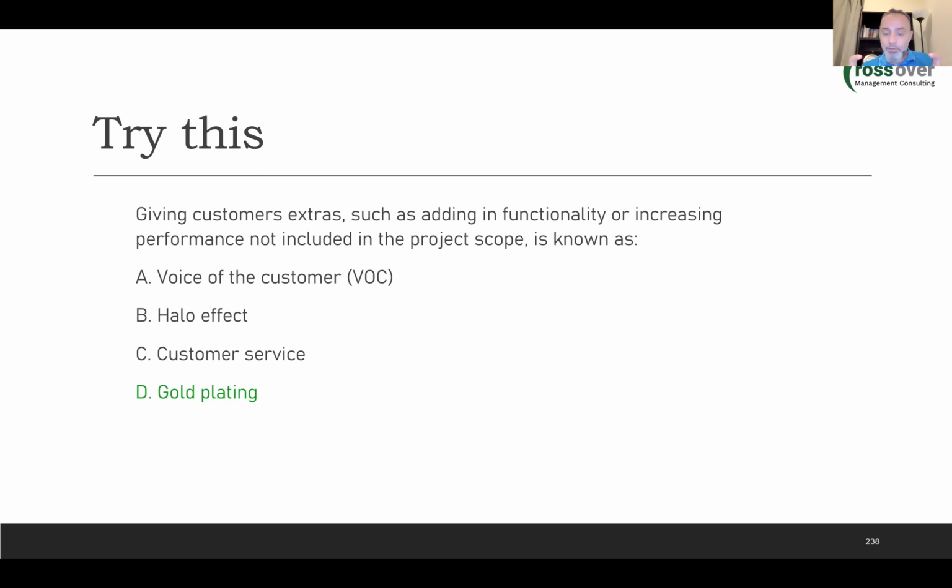Because if you don't agree with the customer on the boundaries, on the work to be included and the work to be excluded, then the customer will start asking you to do additional things that you thought were not included, but since they are not well identified in the scope statement or indicated in the WBS, then you will have this problem of uncontrolled scope creep. And this is again very bad for your project. Okay, does that make sense?